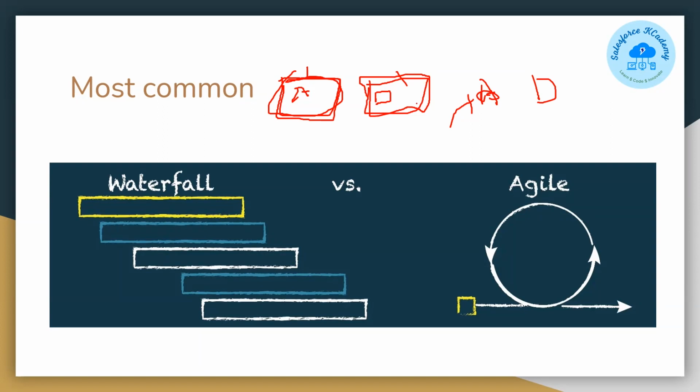So what you do, on the same day itself, you will have a client meeting. In the client meeting, you will tell the client that this is what is happening. We have some correction or some mismatch between whatever you want and whatever we designed. So can we go with this? This is what the discussions are. If the client approves, if the client agrees, then you can go with that. If not, again you have to work on the actual requirement only to implement this one.